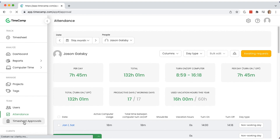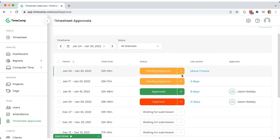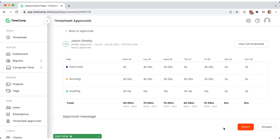To keep an eye on accurate employee billing, managers can approve time submitted by their team members in their timesheets. Simply go to the time approval section and approve or reject the timesheet sent by a particular user.